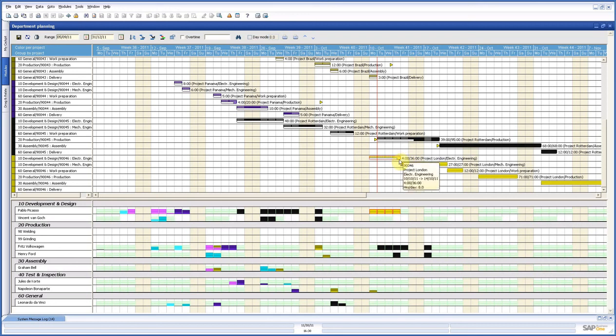So I can say, okay, I pick up these 4 hours and I put them here with Vincent. With Vincent you also see here that he has 2 white spaces. That's because in his calendar it says he only works 3 days of 8 hours, which is the 24 hours of capacity you have here. So this way you can just pick up time and give it out. Very straightforward. And here you have a directly complete overview of the load of your personnel, machines, whatever you need.